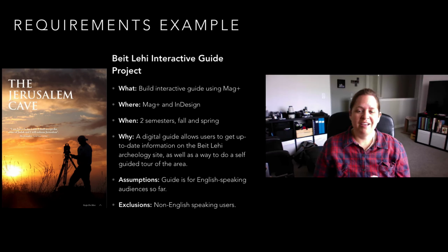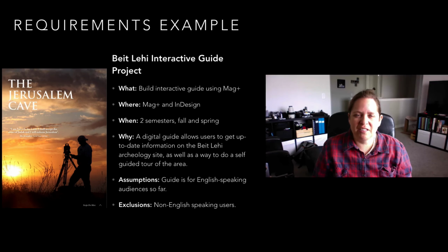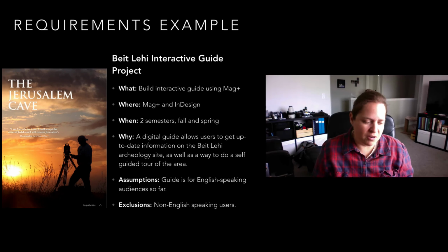So, assumptions. Guide is for English speakers only. So right now it's only done in English. So the exclusion is it's not going to be super helpful if you don't know English. So that helps the team to understand we don't have to worry about translation. So think about these requirements. It really lays it out from a high level of the what, where, when, why, and then building out what the assumptions are. I know I said a whole thing on don't assume anything, but in this case, it's all right.